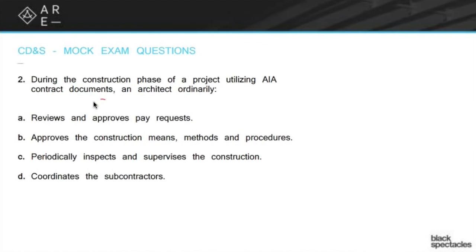Looking at C — periodically inspects and supervises the construction — that sounds very close. You certainly do periodically inspect; that's part of your process. But the word 'supervise' is key. You are absolutely not supervising the GC. If you were supervising the GC, you'd be supervising means and methods and taking on all that liability. And D, coordinating the subcontractors, is clearly the contractor's project responsibility. The best answer is A: reviews and approves pay requests.